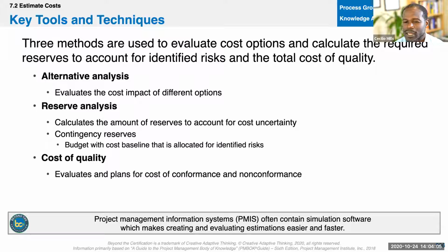If you say, you know what, it's $120, but our team has a 4.7% defect rate or error rate, so I'm going to increase it. Now you're reserving, right? So we reserve, team members buffer and pad. And then the cost of quality, we will see this in not the next process, but the process after, when we get to quality management.